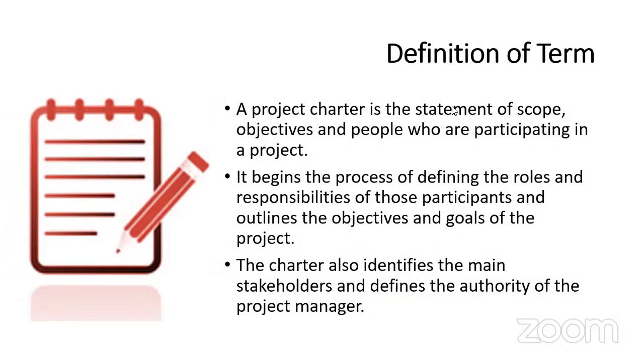Now, a project charter is the statement of scope, objectives, and people who are participating in a project. The statement of the scope of the project, the objectives of the project, and the people who are participating in the project. It begins the process of defining the roles and responsibilities of those participants and outlines the objectives and goals of the project. The charter also identifies the main stakeholders and defines the authority of the project manager.